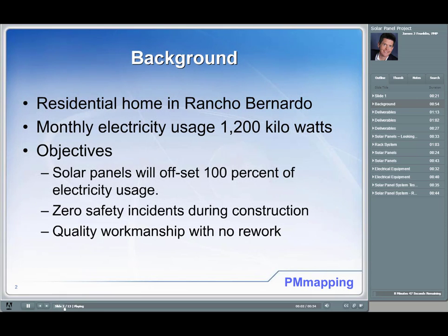Let's start off with the background. This is actually my house. I live in the Rancho Bernardo area and our utility usage was averaging about 1,200 kilowatts per month — that's a big electricity bill. My wife and I are both from the south, and I must admit we tend to like our air conditioning on. The objective for this project was to offset 100% of electricity usage — I wanted my bill to be zero.